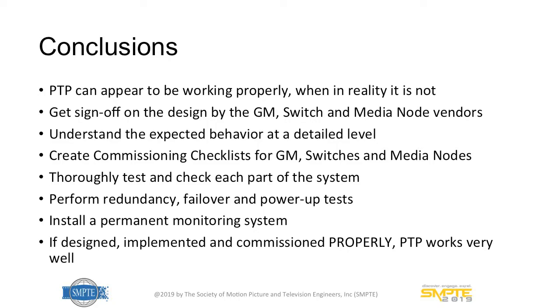You need to understand the expected behavior of your system at a very detailed level. You need to have these various commissioning checklists for grandmasters, switches, and media nodes, going through all the different parameters you want to test. You need to very thoroughly check each part of the system. It may seem like a lot more upfront work, but having done this work, you'll uncover all the little issues, because if you try to just debug it after the fact in an ad hoc way, it can take a long time.